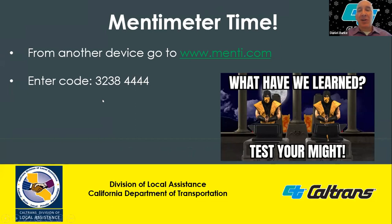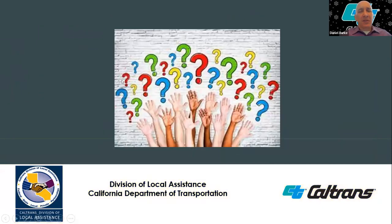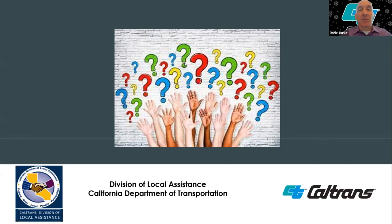Thank you all for participating in Mentimeter. Let's look at some questions from the chat. Jose asks: how do we set a DBE goal for on-call contracts when you don't know how much work you're actually going to give out? Jessica responded that as a best practice, her agency doesn't set DBE goals on on-call contracts — they have them as race neutral. Title 49, Part 26 of the Code of Federal Regulations requires DBE goals to be set on federal aid contracts.